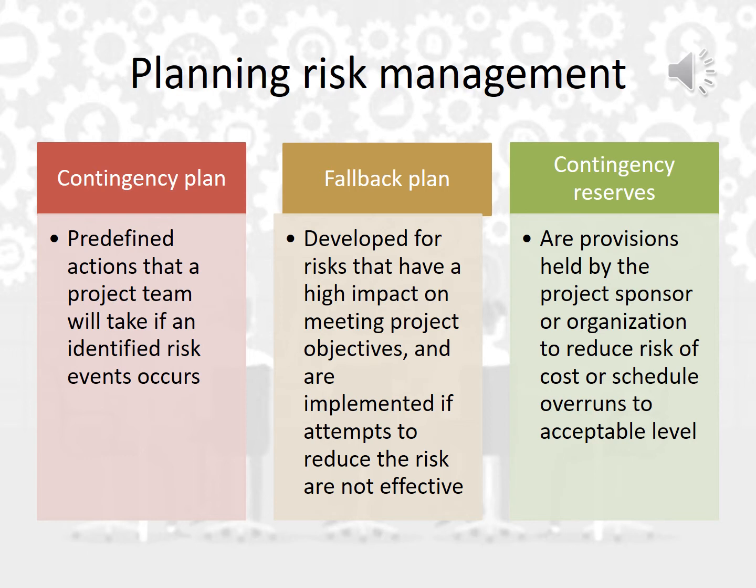While the last one, which is called contingency reserves, is a provision held by the project sponsor or organization to reduce risk of cost or schedule overruns to an acceptable level. So as you can see from the definition of contingency reserves, it means that I, as a sponsor, or I, as an organization, should hold extra money in order to use it if such a risk level happens.